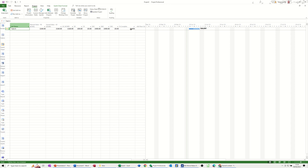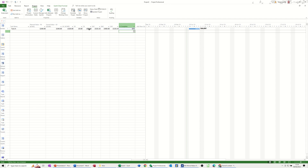Nothing's happened there, but if I change the % complete — this is where it'll get the actual spend. If I put that up to 60%, you can see that's cost me an extra £80 because of that extra person I've added on. That's basically how you can utilise these earned value tables, but you must use it with, one, a baseline saved, and two, a status date, so you can see what the score is up to that status date.